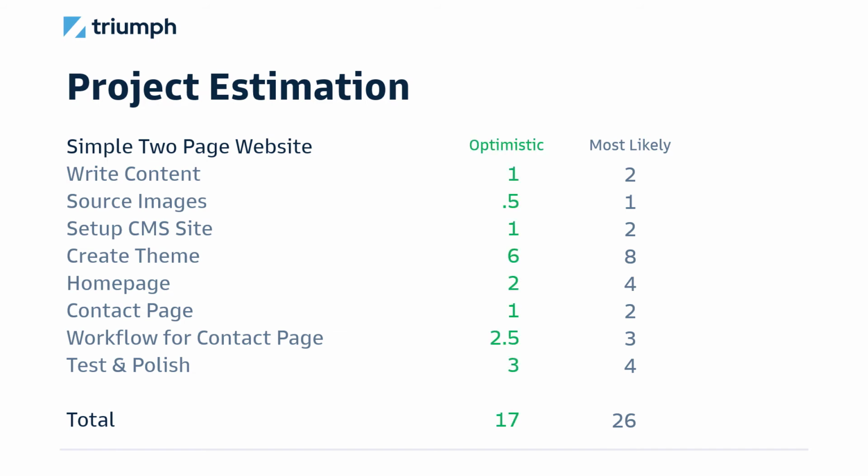Then we're going to say, well, what if everything just goes well? What if everything's right in the world that day and everything's going our way? What's the optimistic number for that item? And then we'll do the same, but on the pessimistic side. Well, maybe things don't go right. So what you can see is this is a really great brainstorming tool. It takes a lot of the pressure off because you can go, okay, I don't need to worry too much about worst case. I'm just going to go right down the middle. What's my most likely? Then I can be optimistic and pessimistic.